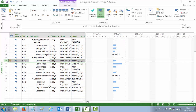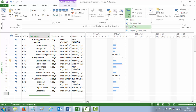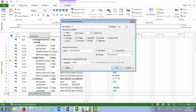The next thing you're asked to do, point number 9, is to enter a recurring task for a weekly meeting, one hour duration, and repeat it for five weeks on a Wednesday. You're then asked to move that meeting task to the bottom of your list of tasks at row 22. Go to your task tab and underneath the task icon, if you drop that down, there will be a recurring task option.